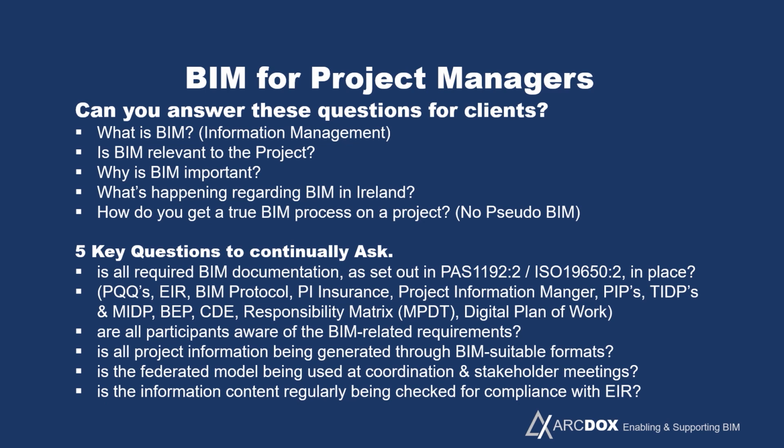Is project information being generated and delivered through a suitable format, so not being printed off and put in a box, but being delivered as a digital file that can be used and leveraged by other people? Is the coordination of the federated model taking place at the regular design coordination meetings, and are the issues being resolved in the digital environment long before those become real issues on site? And is the information being regularly checked for compliance with the employer's information requirements?